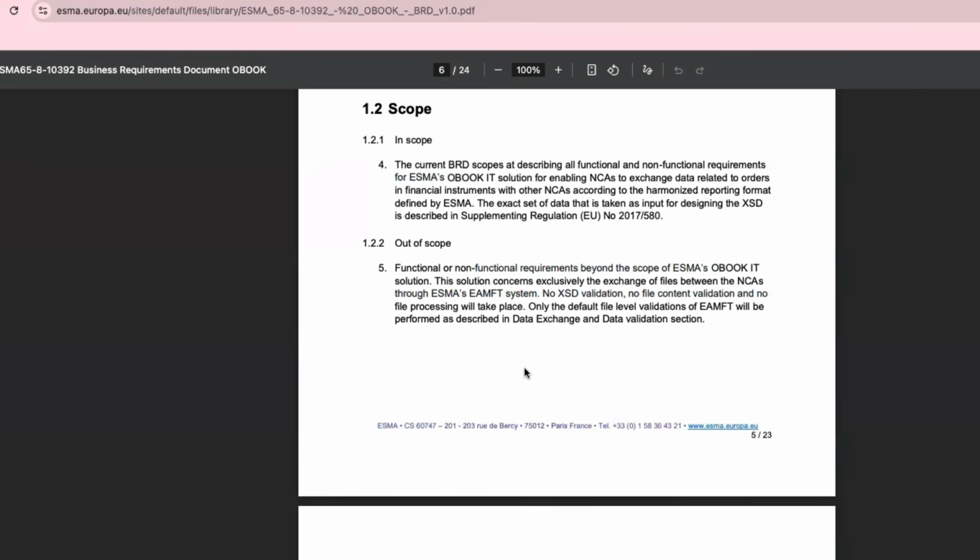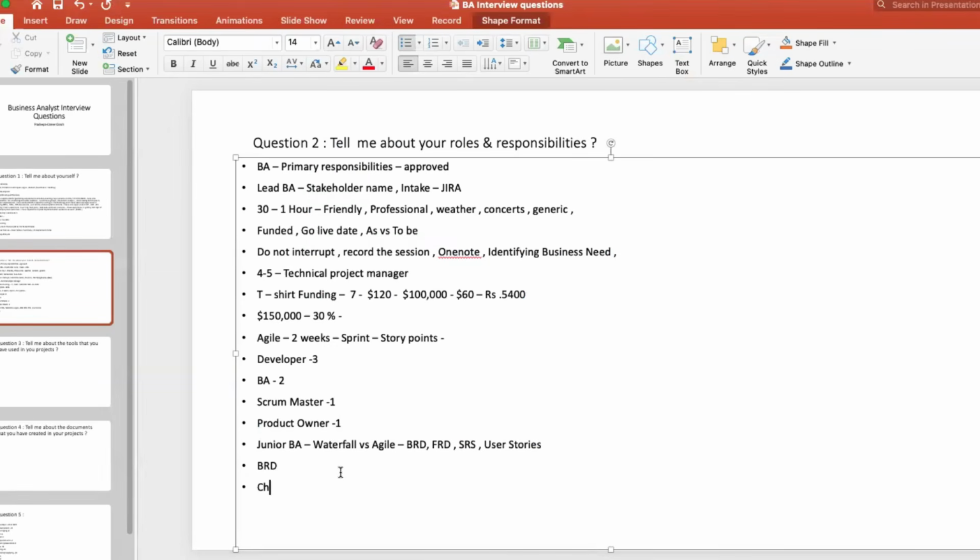So you have two processes. One is identifying scope creep and making sure how long it's going to take for that requirement to be added, and then making sure it's resolved, right? That's one thing. Otherwise, if it's a very big missed requirement and you need additional funding, then that has to come as a change request only. That process is called the change request process. Change request in the sense that business owners have to submit an intake, and then they have to specify all the requirements. Again, you have to redo the versioning of that BRD, get the sign off, then you have to start development.